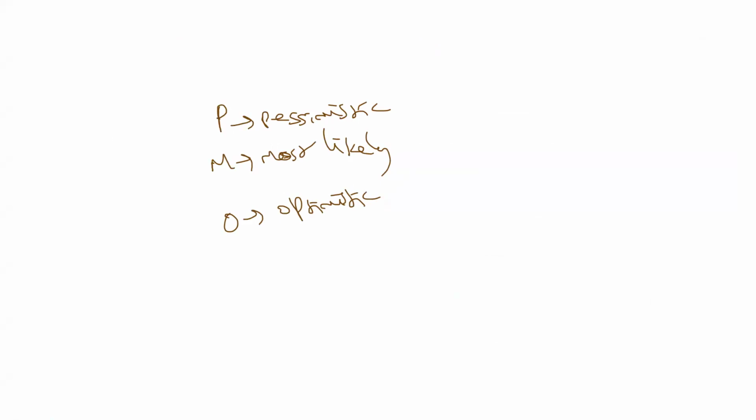If everything goes wrong, the maximum time it will take to finish an activity is the pessimistic time, or how much it will cost is the pessimistic cost. This is in fact the worst case scenario. On the other hand, if everything goes perfectly according to our plan, the minimum time it will take to finish that activity is the optimistic time, which is the best case scenario.